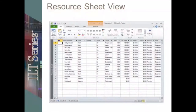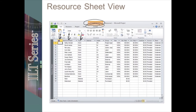The resource sheet view looks like a large spreadsheet. What it allows us to do is to enter in all of the information about our resources. Notice here we have an orange tab that says Resource Sheet Tools, and that format would be directly dedicated to anything in the resource sheet. We have an indicator column, the name of the resource, what type of resource they are — is it going to be work, which of course is people who are working hours; is it a material, something that you're buying; or is it a cost, something that just has a cost associated with it.